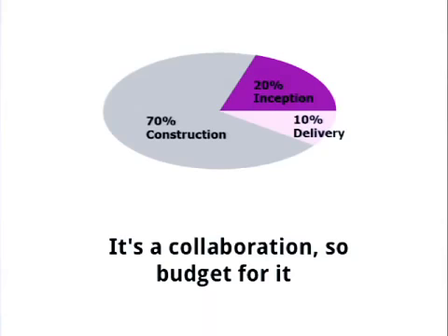And then when you're doing a project plan and when you're laying out your project, budget for it, because you're going to need this time to talk things over and to really iron out the specifics. So no matter how prepared the client is, they might come in and say, no, I've got a 200-page RFP. I don't need any requirements gathering. This is all you need.